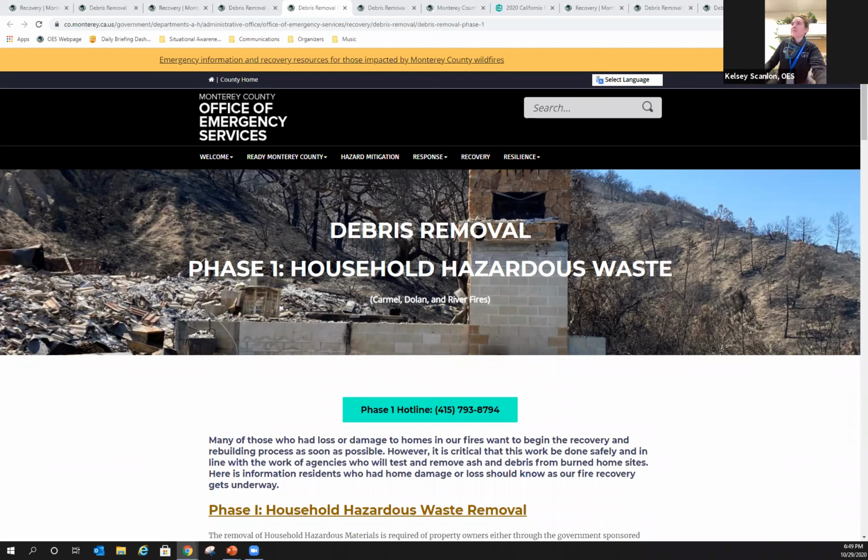Yeah, I will certainly make several comments. The first is that we understand your frustration and we share your frustration and wanting to have an expedited process. I will say, though, that this is the first time in Monterey County history that we've had such a large amount of cumulative damage. It is significantly easier to remove debris when there are smaller quantities. I will also say that we are competing with landfill resources that 21 other counties in the state are also planning on utilizing for the vast amounts of debris that they are also anticipating on removing from their operational areas.